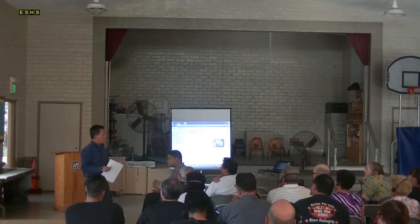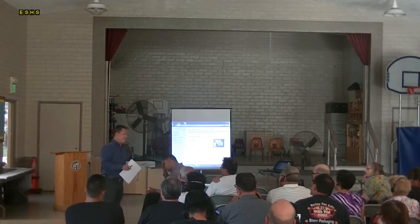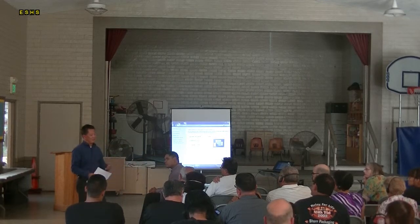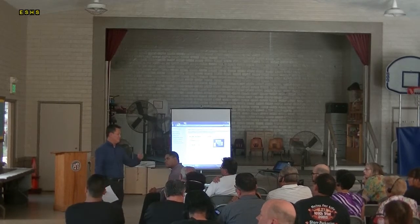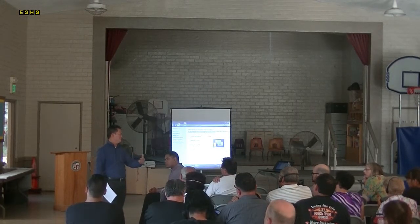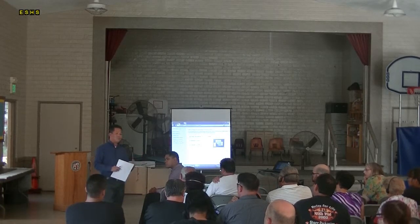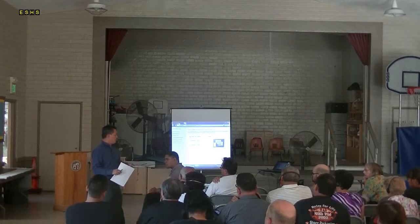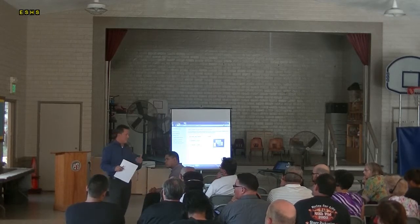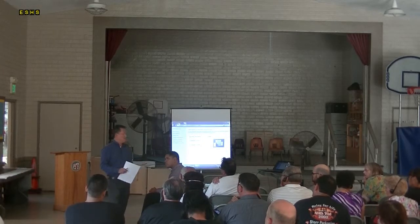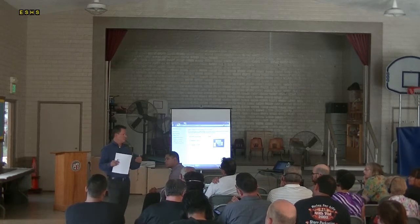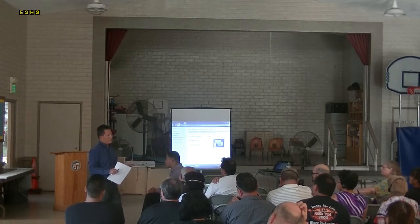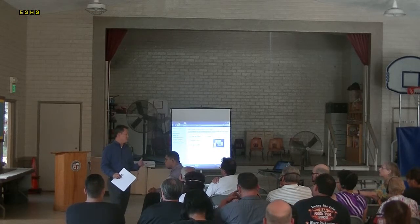We've been working closely with the Department of Transportation as well as street lighting on revising and updating the traffic control plan to go into Stage 1. Keep in mind Stage 1 consists of 6 phases — phases 1 through 5 and so on. We have a temporary traffic signal, and temporary traffic lighting has been approved. We're waiting for DWP to provide service so we can start to implement the signal and lighting.